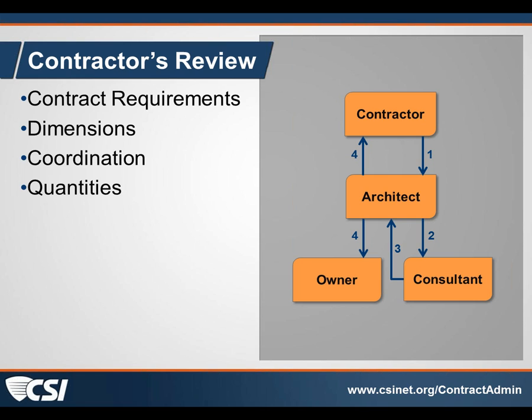So after he reviews them and approves them, they come to the architect. It may be that it needs to go to a consultant who will review it and return it to the architect. There may be some submittals that need to go to the owner for their input. So that's kind of the workflow. And maybe there are some state agencies, the same process.